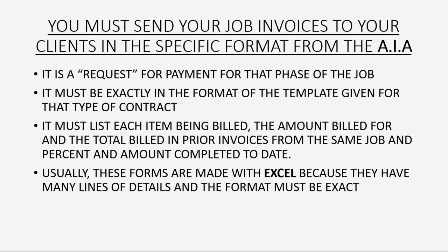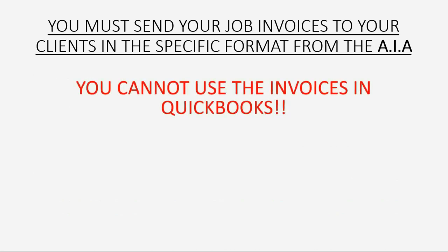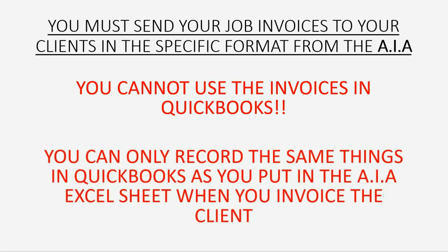The important point here is that you must send the bill in this format whether you use QuickBooks or not. And that means that you cannot use the invoices that come from QuickBooks. You can only record the same things in QuickBooks as you put in the A.I.A Excel sheet when you invoice the client.